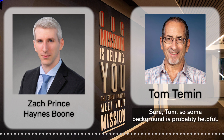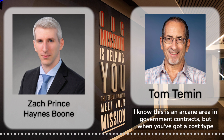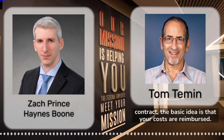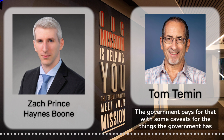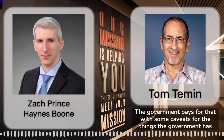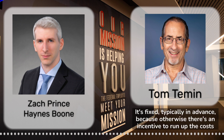Sure, Tom. So some background is probably helpful. I know this is an arcane area in government contracts, but when you've got a cost type contract, the basic idea is that your costs are reimbursed. You've got your actual cost experience. The government pays for that with some caveats for the things the government has decided they don't pay for. And then on top of that, you've got a fee. It's fixed typically in advance because otherwise there's an incentive to run up the costs.